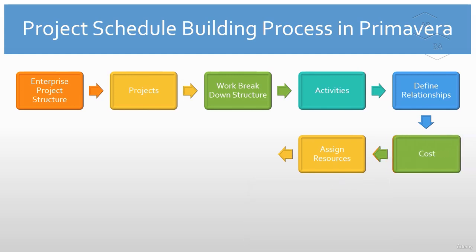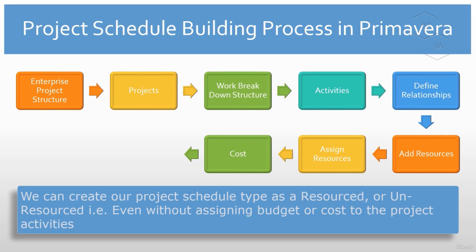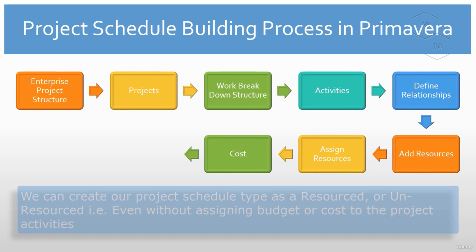After that, we will assign resource costs to our project activities if required. An important thing to mention here: you can create your project schedule as a resourced or unresourced schedule even without assigning budget or cost to the project activities. So it purely depends on the type of project schedule you want to create and your project needs or objectives.